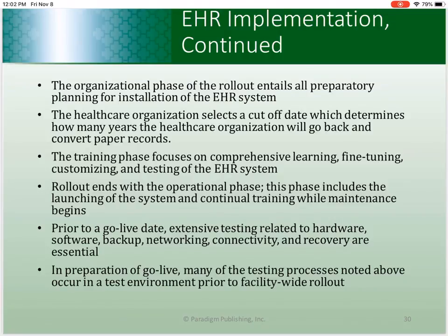Then there's planning for an end-of-day briefing: these are all the problems we've come up with, with users throughout the system. These are the things we've been able to fix. These are the things that we still have in support. We've got the developers working on these. So you've got that sense of where you are each day once you've hit your go-live date and you've started using the system.